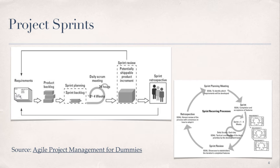We have a daily scrum meeting to organize the work by viewing what the team completed yesterday and what it will work on today. In this way, the sprint team reassesses its progress toward the sprint goal each day. And at the end of the sprint, we hold a retrospective meeting to assess performance and plan necessary adaptations to the product backlog.